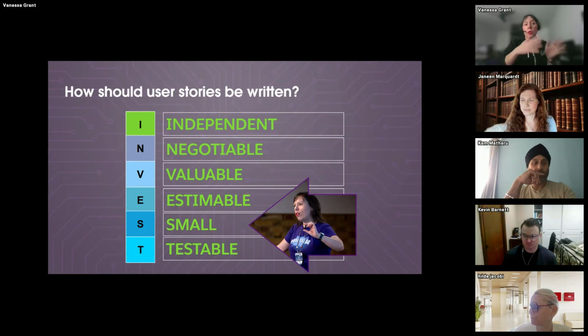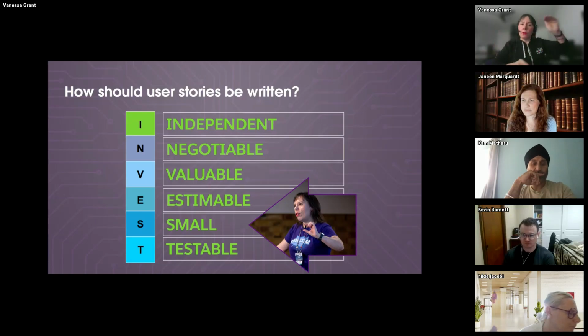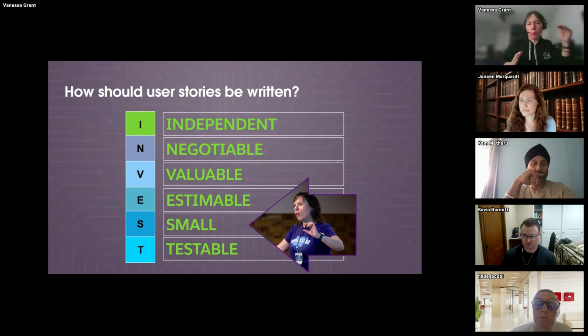I think also, and this is where the DevOps process comes in, if you have a lot of functionality in one user story, it's going to be a lot harder to move that through the DevOps pipeline and get it into production. So let's say you've got 10 things in this user story. If 9 of them are moving to production smoothly, but one is getting stuck, there's some error and you're having to troubleshoot it, you are holding back all the business value from those other 9 points. And what Agile is all about is how do we get to business value faster?